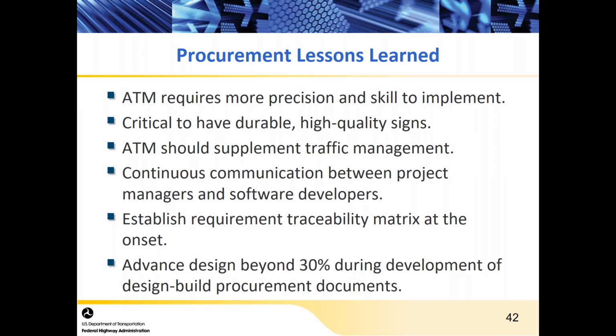Here are some procurement lessons learned that came from some of the sites that have deployed ATM, that it does require more precision and skill to implement these than some more traditional strategies. The signs that you're going to deploy need to be durable and of very high quality. You're expecting a lot of those signs. And ATM should supplement your ongoing traffic management activities.